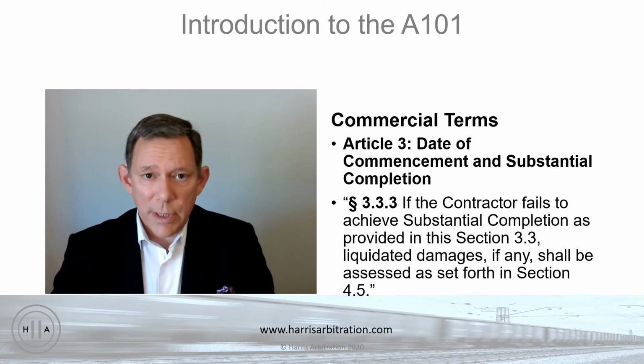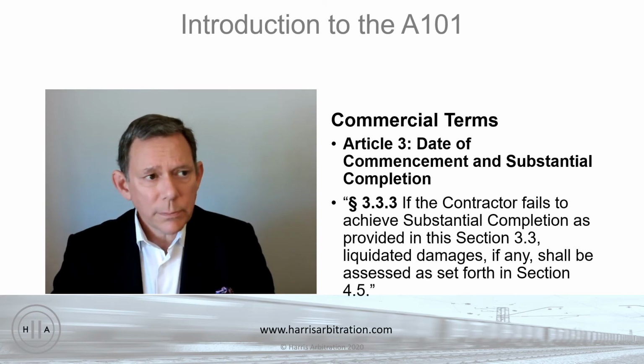So in my skyscraper example, if the contractor had done everything except install a couple of doorknobs, well, that would certainly count as substantial completion. And substantial completion is defined elsewhere in the contract documents, and we'll get to that in a later session, but I just want to give you a refresher on the whole doctrine of substantial performance and how that translates into the context of a construction contract.